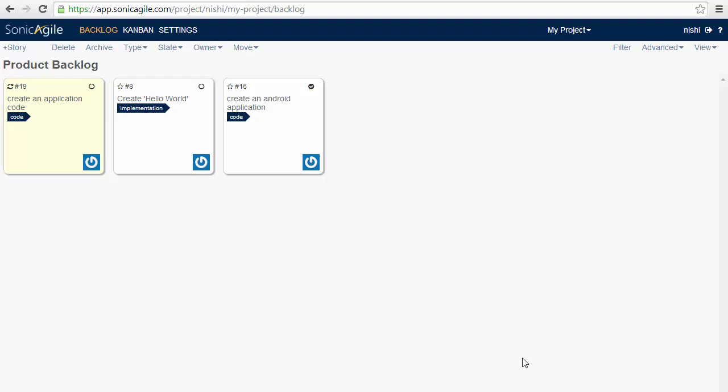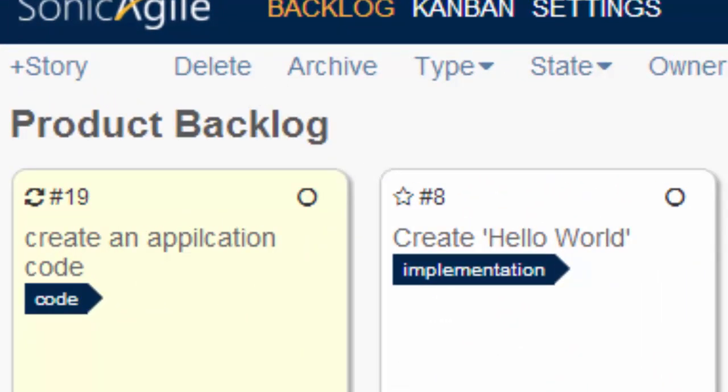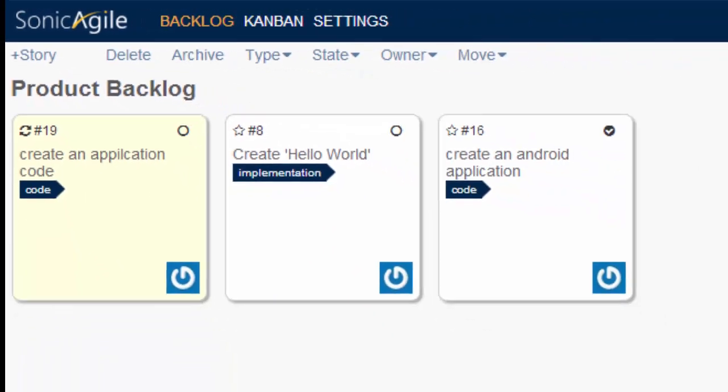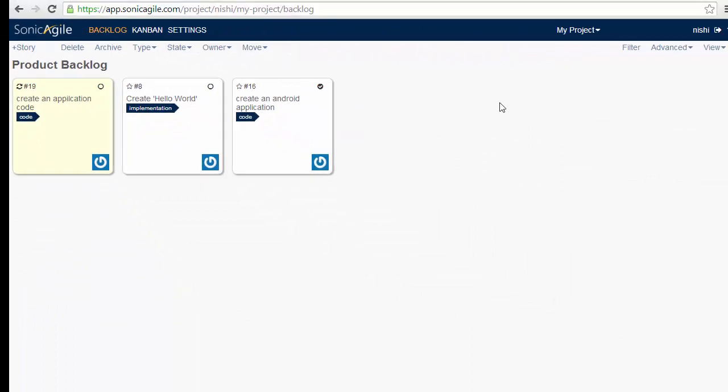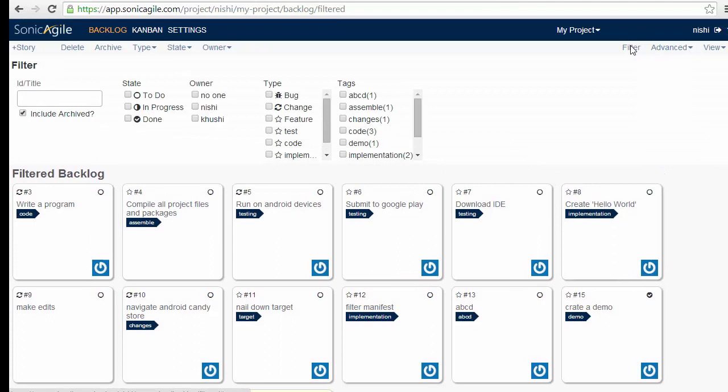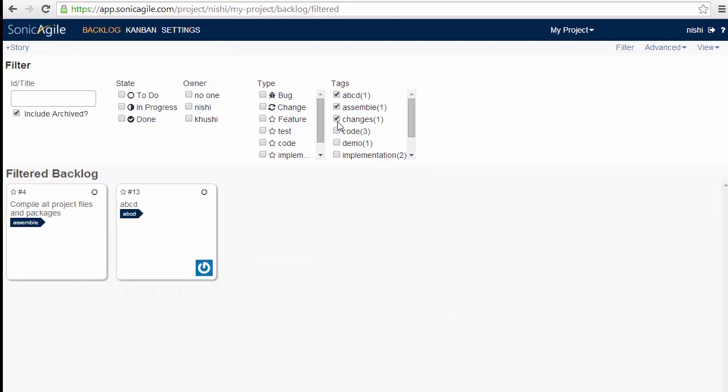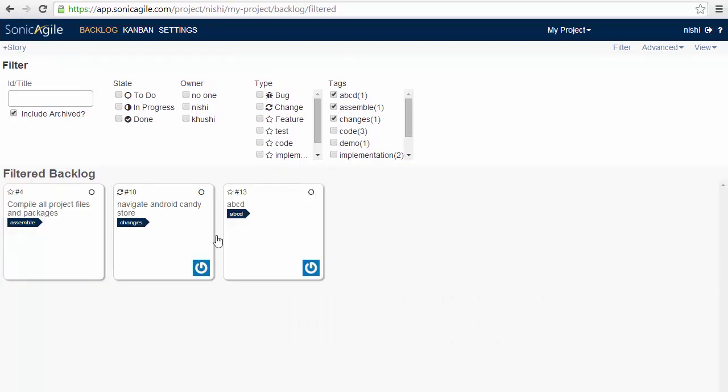The next feature is tagging and filtering. As we have already introduced tags in our stories, we can add custom tags in any string of the backlog and we can take advantage of the filter by tags or other criteria. For example, if I am using the tags, then I can see only those stories that have the particular tag.